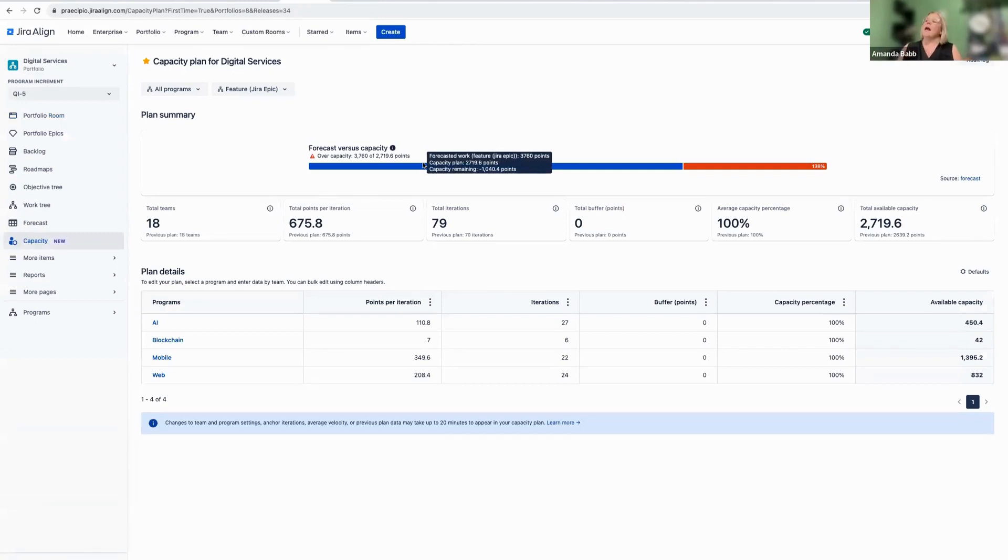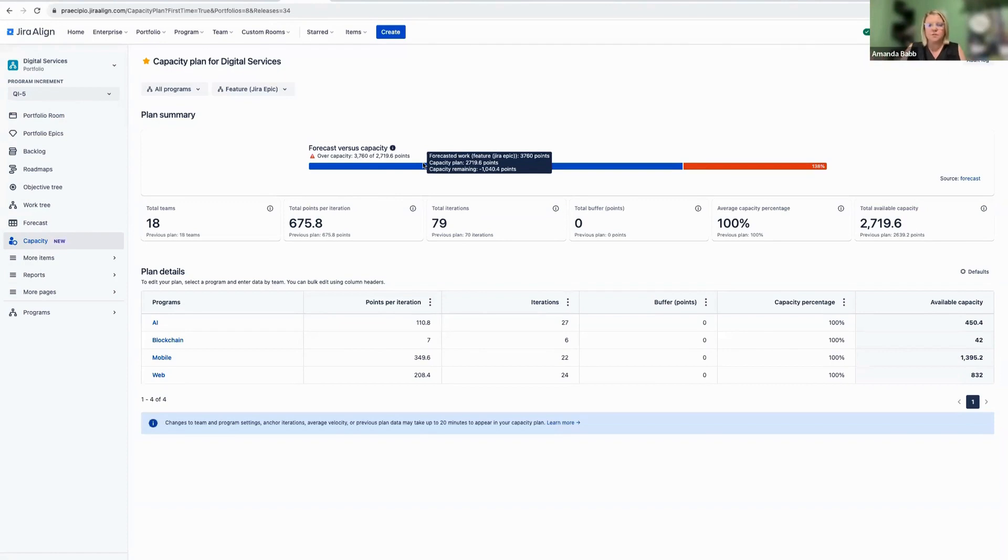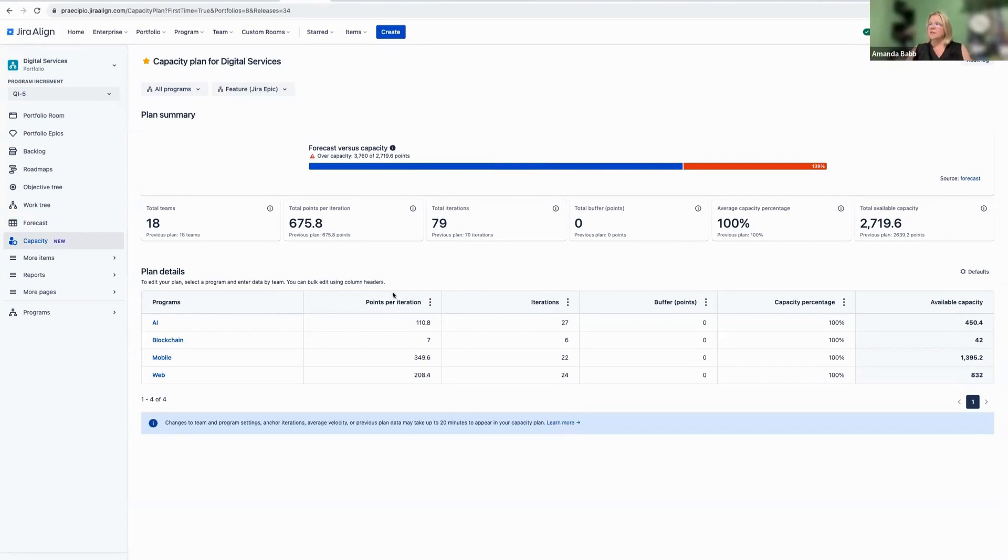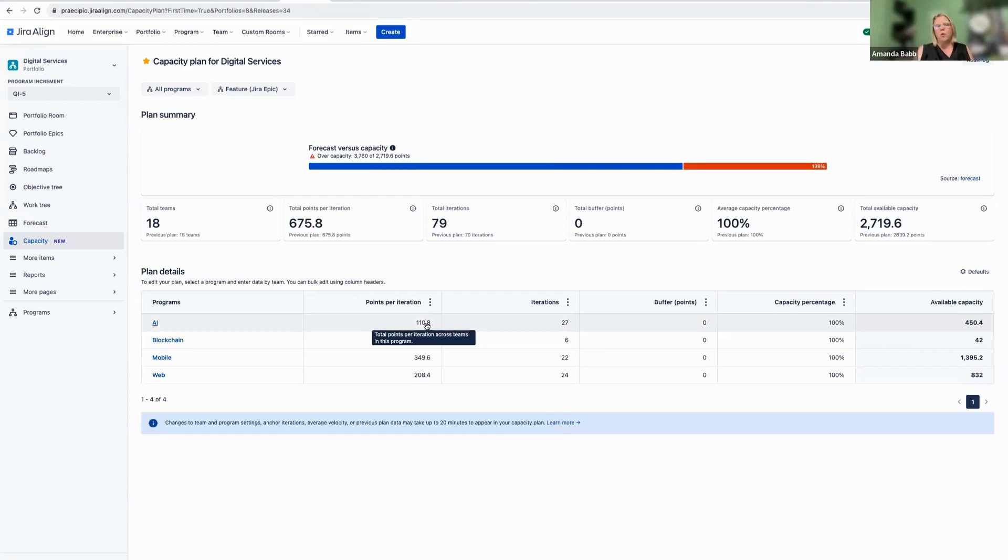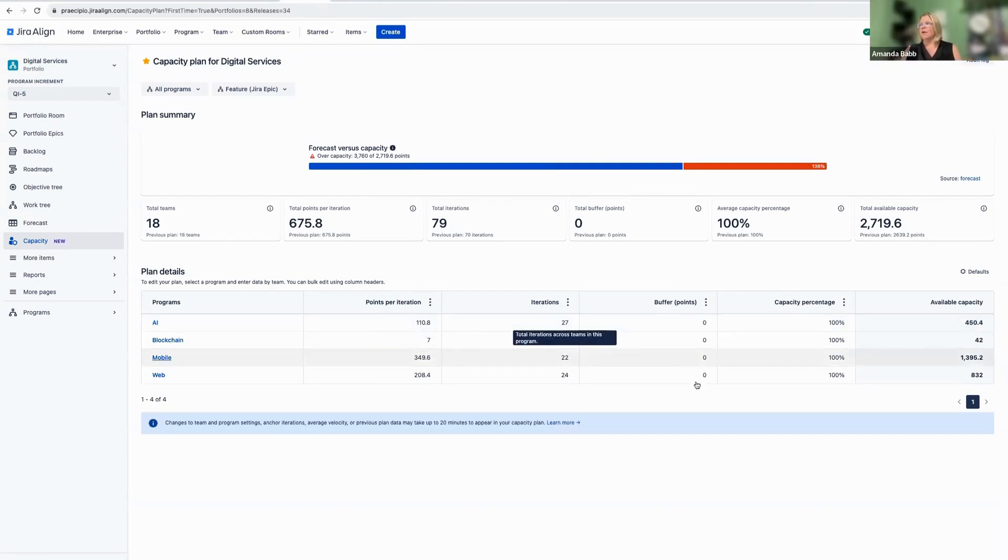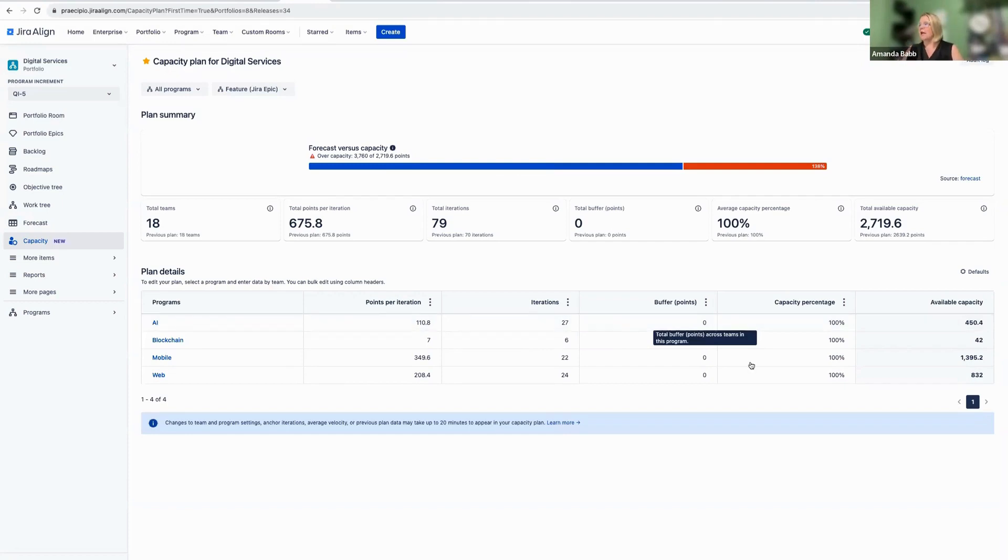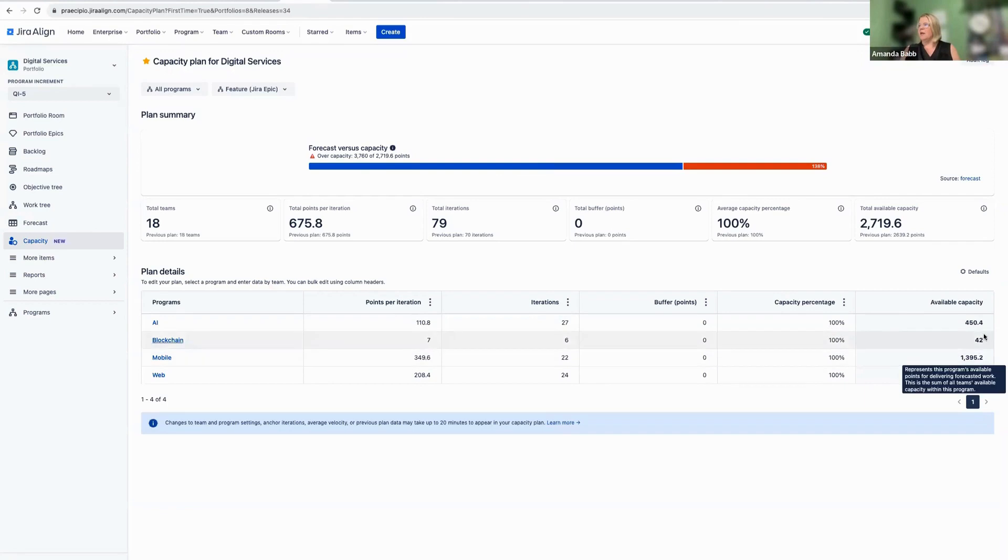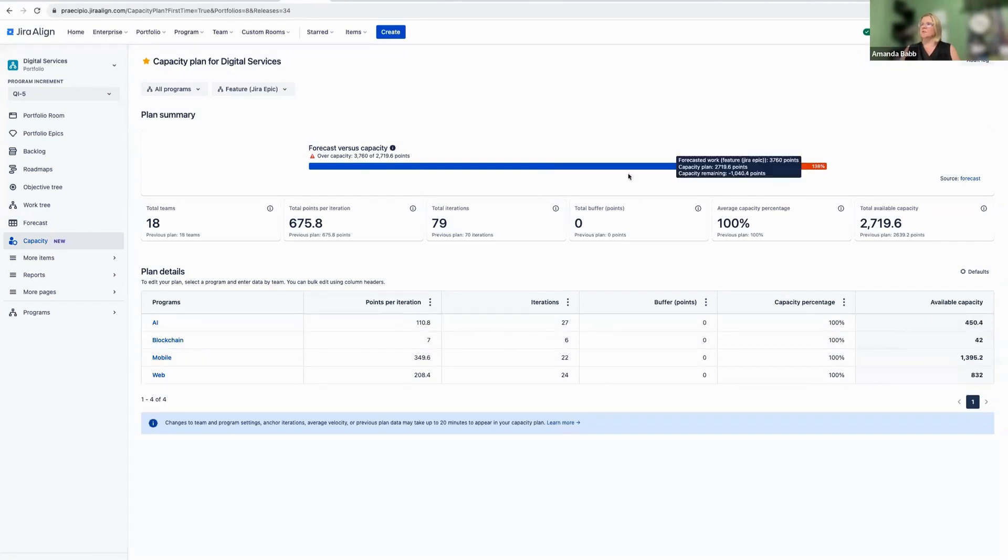How is that calculated? So in this particular case, we know that we love story points. We love Agile teams to work within the estimation statistic that they're used to. So a couple of quick things. First of all, points for iteration. So this is going to be the total points per iteration, aka Sprint, for all the teams in these individual programs, the number of total iterations across the teams in that program, any sort of buffer points, which I'll get to in just a sec, a capacity percentage, and then your available capacity, and that's what we're seeing here, is that overall calculation.